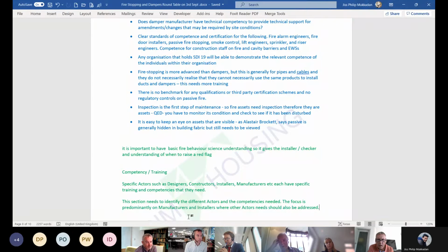It is, and one of the things that we're working on is making all of that information more machine readable, so that you can build that into a master information delivery plan, for example. It should be structured in a data schema, which different software applications can use. So the common data environment should be reading from that master information delivery plan and the AIR to automatically validate whether that information has been provided. Unfortunately, that's not the way it is at the moment, but that's the journey that we're on.